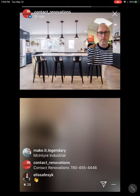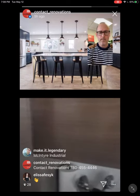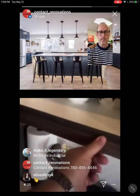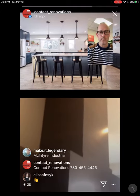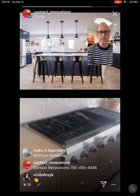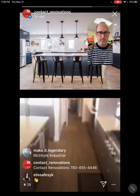Yeah, absolutely. The whole idea of replacing the doors is to get a different color. So when you replace the doors, you now have to replace the edging, the light valances, all kinds of things. Like, what would you do with the hood? Well, you have to replace a whole new hood. Right? And by the time you're done, you're at about 75% of the kitchen. Absolutely. So for another 25%, you just get a whole new kitchen.